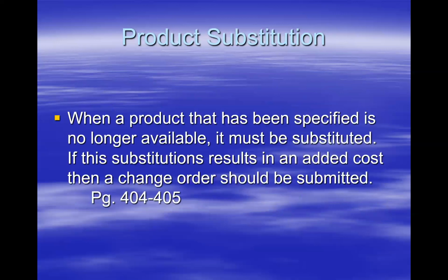Product substitutions: when a product that has been specified is no longer available, it must be substituted. If this substitution results in an added cost, then the change order should be submitted. I've had this happen on projects where, going back to that light fixture example I used, it was specified as this fixture.